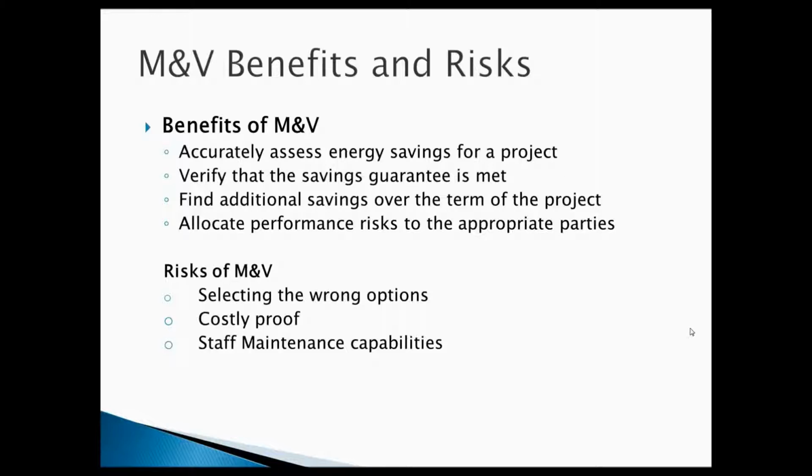And then you have to look at your staff maintenance capabilities, because in the contract there will be a list of things that you need to do with this new equipment. Now, most places have their own maintenance people and they take care of the equipment that's been installed. Some customers have to hire maintenance companies to do that. So you need to take a look at what's in the contract that says, in order to maintain this equipment, this is what needs to be done.